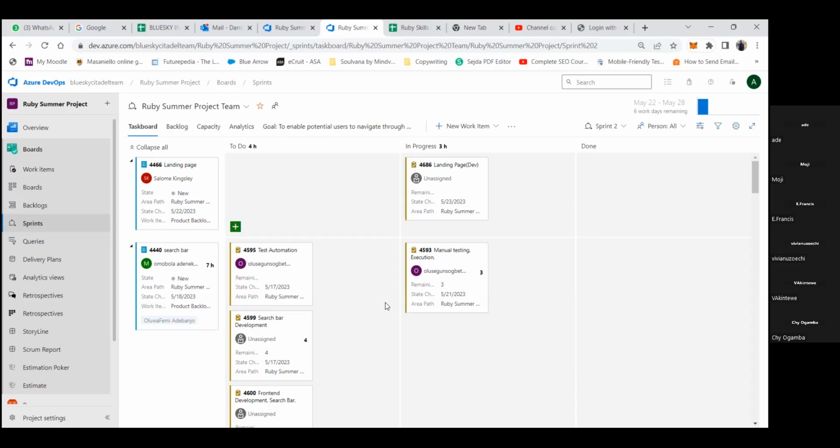But when he was given the capacity, what was his capacity? It's 3 per day. 3 per day, times 7, which is what? 21. Can you see that he has overestimated? Okay. And that is another thing you need to help your team, coach your team to be able to do. And what that does, I will show you where that flags up.